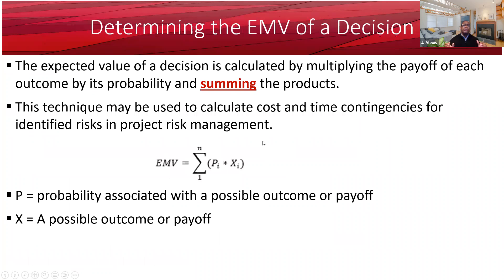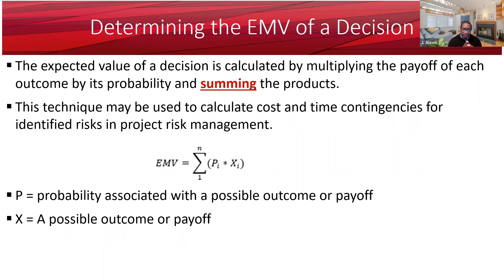How do you determine the EMV of a decision? The expected value of a decision is calculated by multiplying the payoff of each outcome by its probability and summing the products. I highlighted, bolded, and underlined 'summing' for a reason: you do not have EMV until you sum the products. EMV is not just one product — EMV is the sum of the products. You can use this technique to calculate cost and time contingencies for identifying risk if you're managing risk in a project.